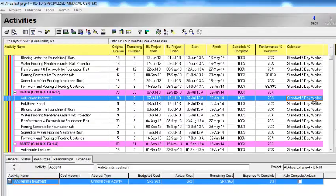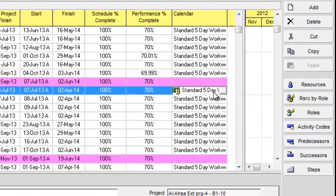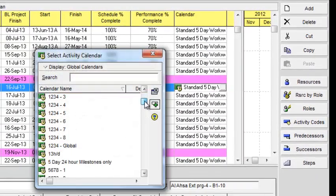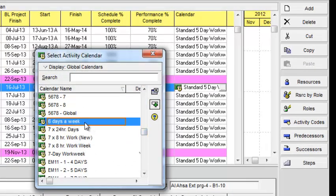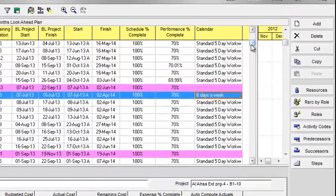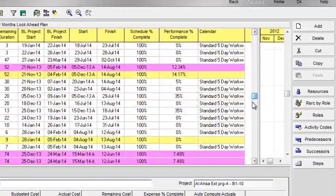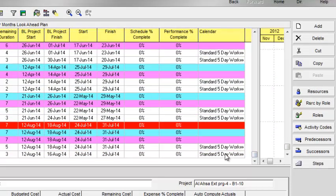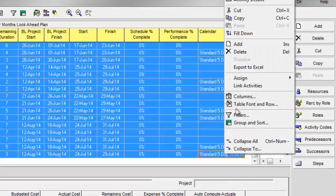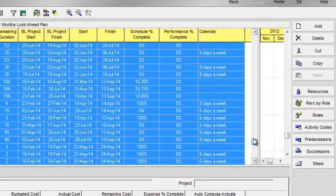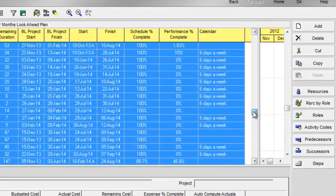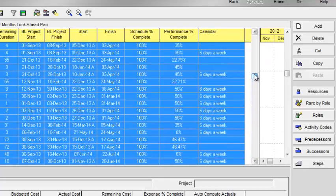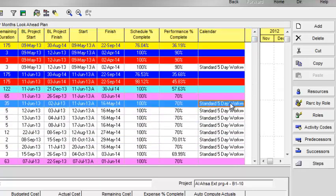Now if I want to change the calendar of all activities under this WBS, I will change this calendar to six days a week. I want to assign the six days a week calendar to all the remaining activities of my project. I will select all my activities, right-click, and fill down. Now the six days a week calendar is assigned to all the remaining activities, and the five days calendar is assigned to this WBS according to the requirement of the project.